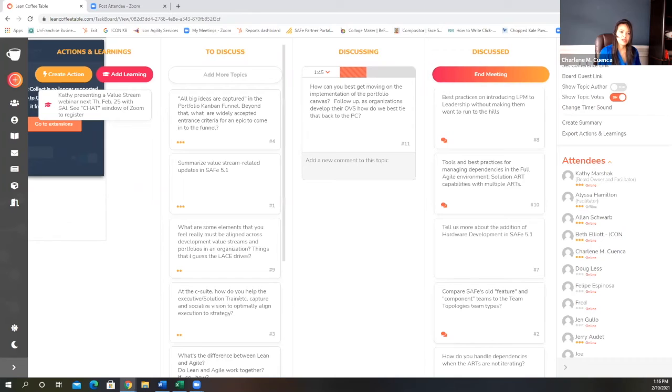What are the big business units that are set up today? How are we funding some of the things that are focal points for some of these businesses? And are they really portfolios, or are they just funding lines? So you can use one of these canvases, the portfolio canvas, to help understand, is this really a portfolio, or is this really just a funding line? So once we start to have that big picture understanding, then we can take a look within a specific business area and identify through that value stream identification workshop what are the different products, solutions and services that we actually build as part of this business area.